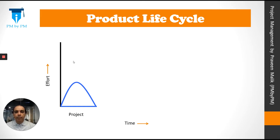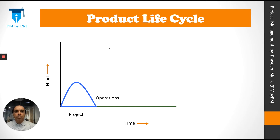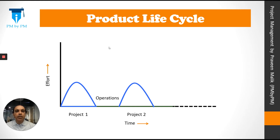Let's look at this diagram. You have an x and y axis — on the x axis there is time, and on the y axis there is effort by the project team. Initially a product is conceptualized and a project is started. At the end of the project a product is created and handed over to operations. Operations maintain it for a long period of time, and then another project is initiated to upgrade the first product and produce a version 2. But the operations keep going on and on until the end of the product — that is when the product is retired.